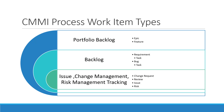For the CMMI process, the work items remain largely the same, only the terminology changes. What Agile calls a User Story and Scrum calls a Product Backlog Item, CMMI calls a Requirement. Additionally, for issue, change management, risk management, and tracking, four more work item types are provided: Change Request, Review, Issue, and Risk as separate work item types. This covers the theoretical part of the different templates available when creating your project.